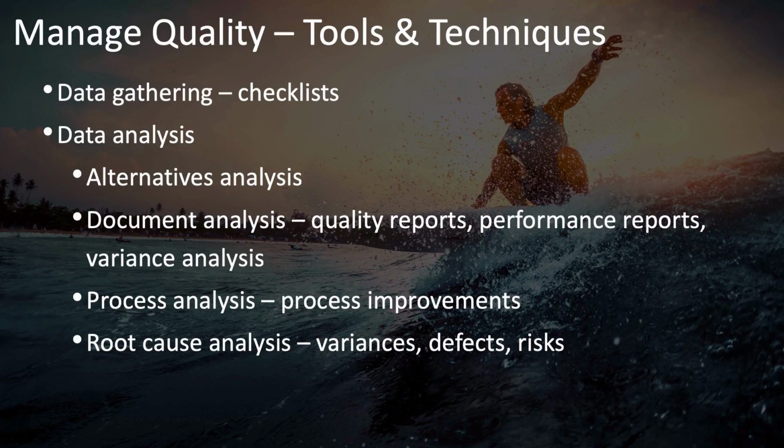Some of the tools and techniques of the managed quality process include data gathering. One that's specifically mentioned is checklists, which can be useful to you in making sure that you're following all the right steps that you should be. And various data analysis techniques, including alternatives analysis, as you consider lots of different ways in which you can manage quality and control it. Document analysis, including analysis of things like quality reports, performance reports, and variance analysis.